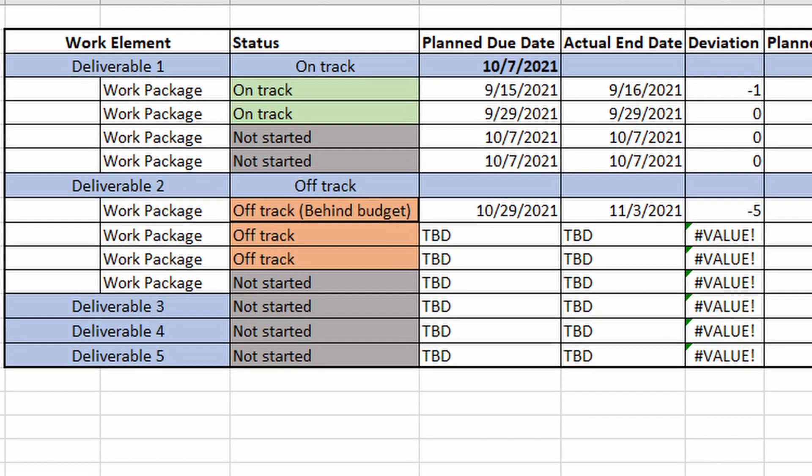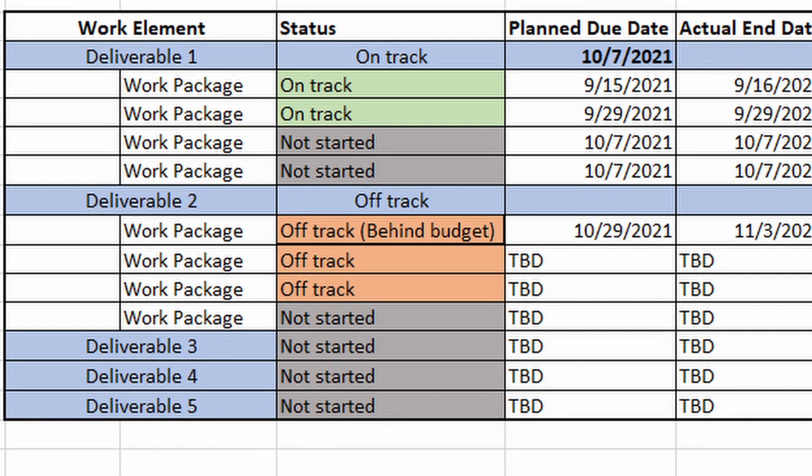You want to report only on work packages that are currently in progress. For deliverables not yet started, you don't show work packages; and for deliverables you've finished, you don't show work package details — just sum up the actual results. This simplifies tracking for you and your clients. Usually you'll be monitoring just two, three, maybe four deliverables at a time. If you were behind schedule or over budget for previous deliverables, you will see those deviations at a glance and know you need to catch up.